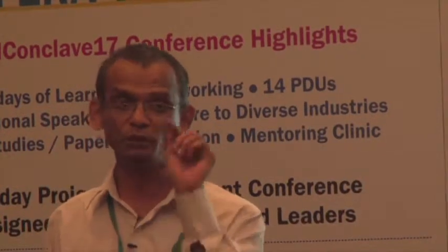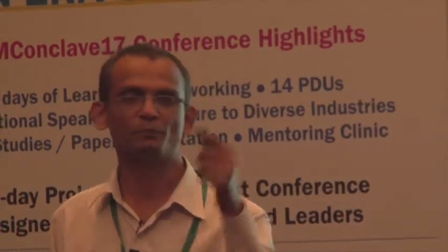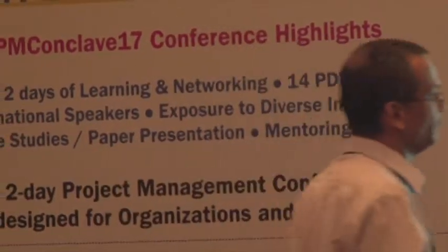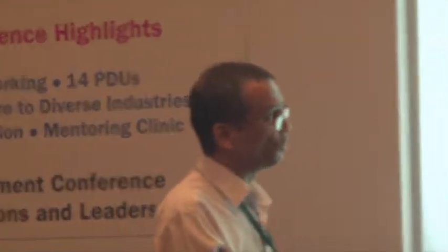But since we need to put only one number, either in Primavera or MS Project or whichever software you use, because we have only one column for the duration, we force that person: please give me one number. Don't say 5 to 7 weeks. Say either 5 or 6 or 7 or 6.5 or 5.5, whatever, but give me one number. So actually we want to close our eyes to reality, because in reality, the person knows it is going to change. So we need to plan for it.